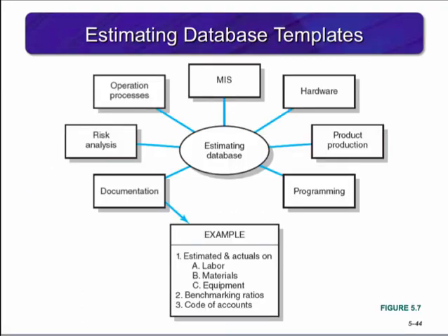The best way to improve the accuracy of estimates is to collect and archive data from previous projects, both estimates and actuals. This approach allows the project estimator to select a specific work package done in the past and glean information for estimating the current project. Over time, historical data and the degree of accuracy in the database should improve. The image on this slide represents the structure of a database similar to those you might find being used within organizations. The different departments will add their project estimates, allowing the other departments access in hopes of creating a more accurate estimate.